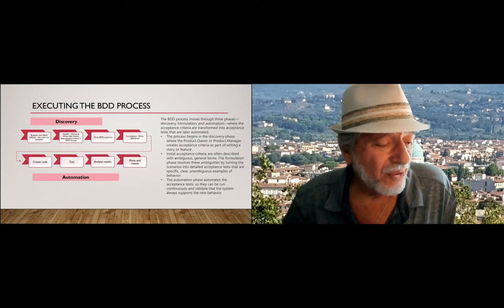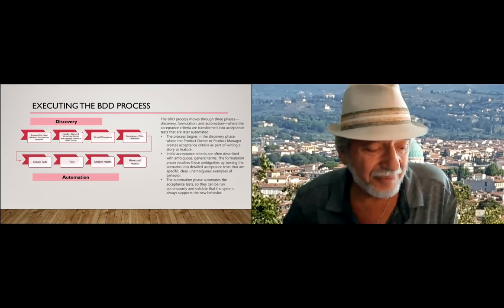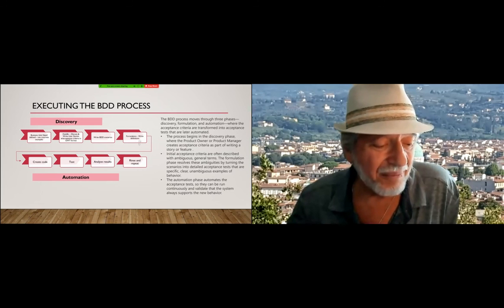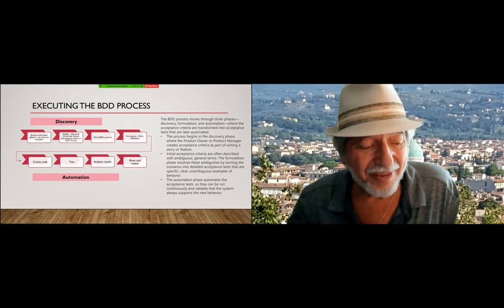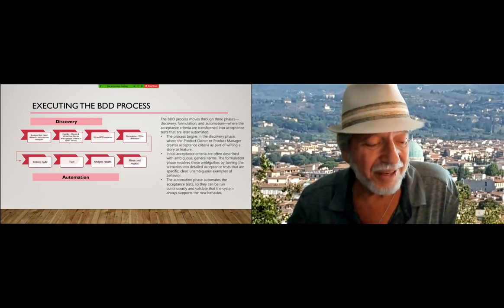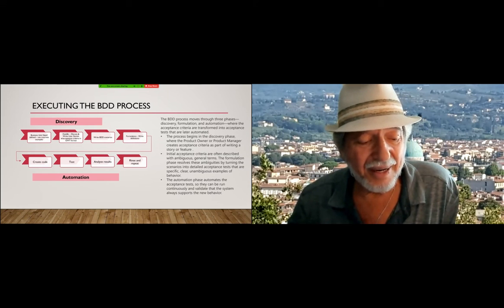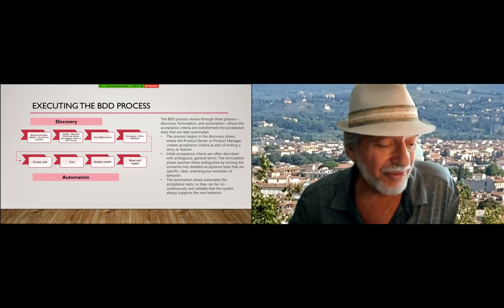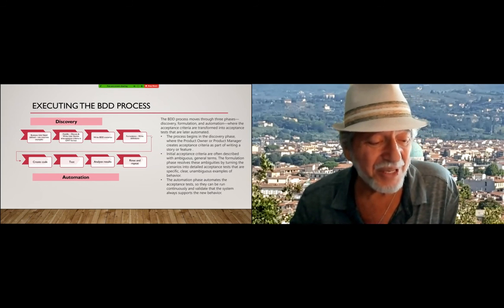This is all happening at a feature level and not on a story level? Yeah, this goes on at a feature level, but then what happens is in the backlog refinement, when you're defining your backlog. So what you're doing here is taking the stuff that went on before and continuing to refine it. And then you go ahead and start building the code. So coming out of here is when I'm going to have my stories that I can then work on